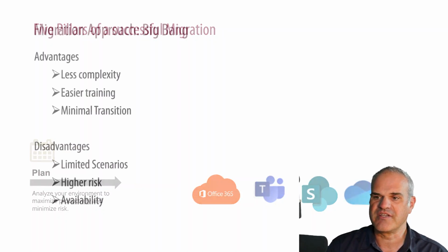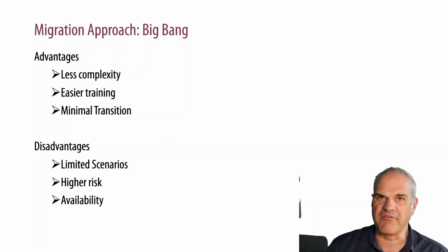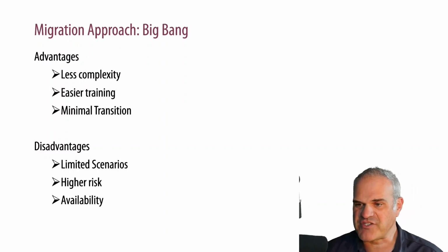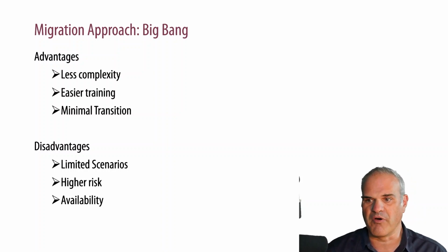So let's start with number one, planning a migration, analyzing your environment in the source and also in the target. And here we are currently finding different approaches to migrate. The first one is very well known. It's not very work-life balance friendly because usually you do a big bang over the weekend. You start Friday evening and you end Sunday night doing the migration because the end users expect that everything works smoothly on a Monday morning.